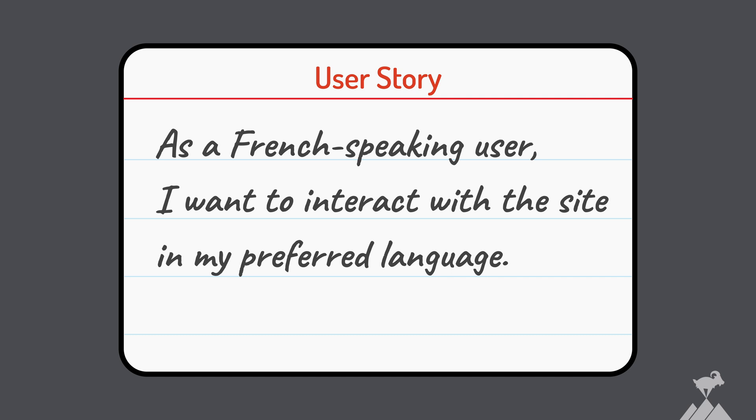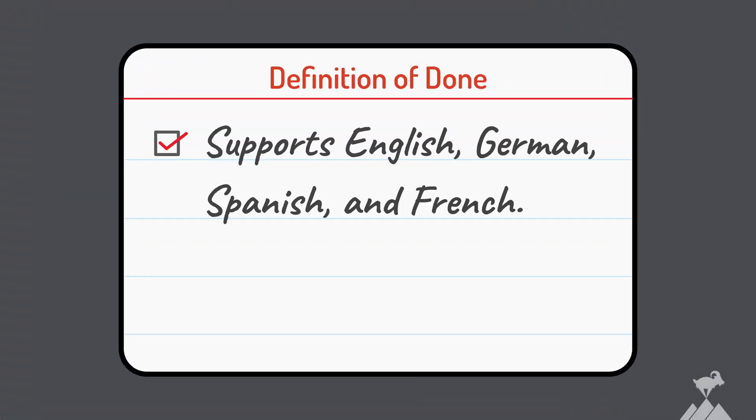Another example: maybe you support English, German, and Spanish, and you want to add French. You begin with a story — 'As a French-speaking user, I want to interact with the site in my preferred language.' Again, as it becomes a priority, it's worked on and finished. Then you update your definition of done to say: supports English, German, Spanish, and French. This approach works because it enables adding support for new non-functional requirements to a product, but also helps a team remember the ones they need to continue supporting.